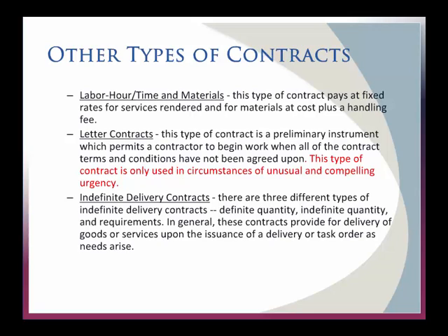And I can drop new tasks on this very quickly, and it allows me to not go through the full contracting cycle. I've already competed that. There's even some cases where you can have multiple contractors that can do the work. So this is becoming very attractive as a way to get things done quickly and expeditiously without having to go through the entire acquisition cycle.